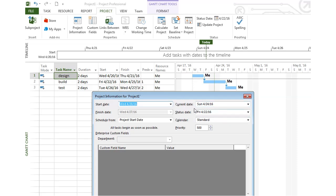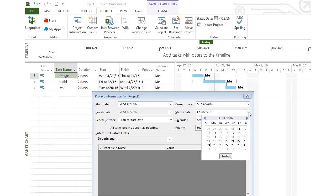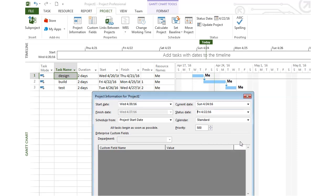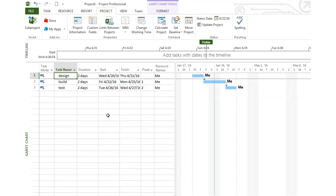But then we have something called a status date. As a project manager, you may not be updating the status every single day, but maybe every Friday or every other Friday. This status date, you mark as the day you're entering information about your tasks and how far they are completed. So I'll put in the 22nd. Let's say I talk to all my employees, and on the 22nd I'm going to update the status as of that day.